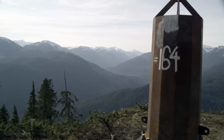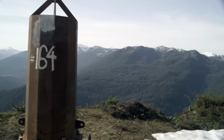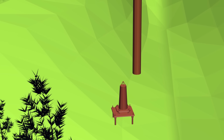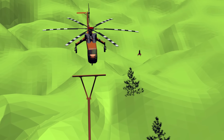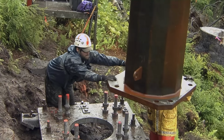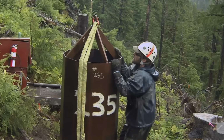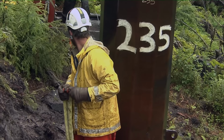The stovepipe was not part of the original design package and was specifically developed by Wilson for this project to quickly and safely maneuver a pole suspended by a cable 100 feet below the helicopter into the correct position on its foundation. This minimizes the expensive hover time of the helicopter while eliminating the presence of a crew to catch live steel loads. After the stovepipe is bolted down and leveled, the crew is ready to pick up its tools, be picked up, and move on to the next site.